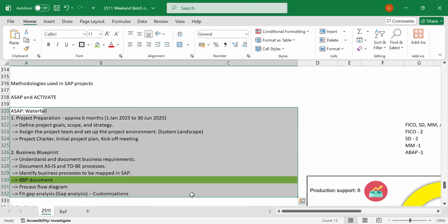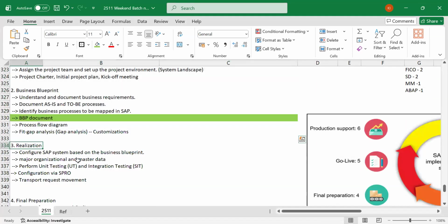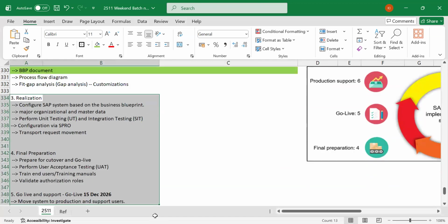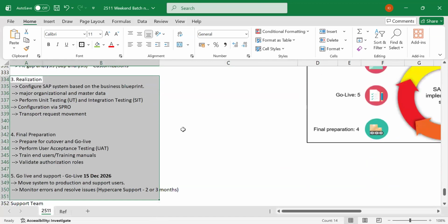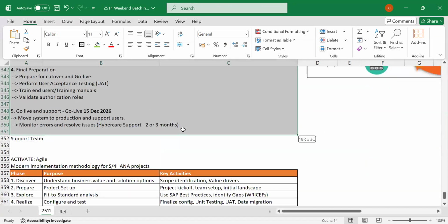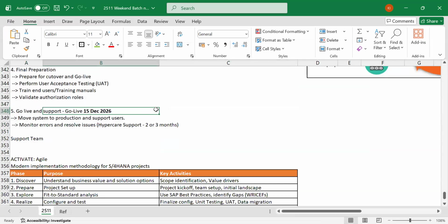Once they finalize the requirement, from here realization phase, it will take approximately 1 year, right, or more than that, until you go for a go live. Until this date, your business will not pitch in, or if they pitch in also, you don't entertain any changes. You can listen to them and tell them, okay, I understand, we'll do that later. Only after the go live, you will do it. So they need to wait until you finish this product.